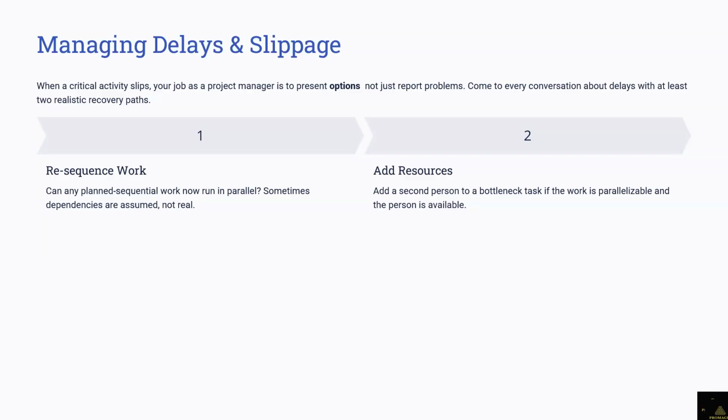Yes, you can proceed. Then, even though nothing has been signed, an email is a contractual document. Once something is exchanged through email, it is contractual. Nothing needs to be signed. When the project has commenced, even though they've approved it, the formal change order has not been signed. Usually, it's common knowledge in project management that you can start proceeding with work because the project manager who has authority has given you authority via email.